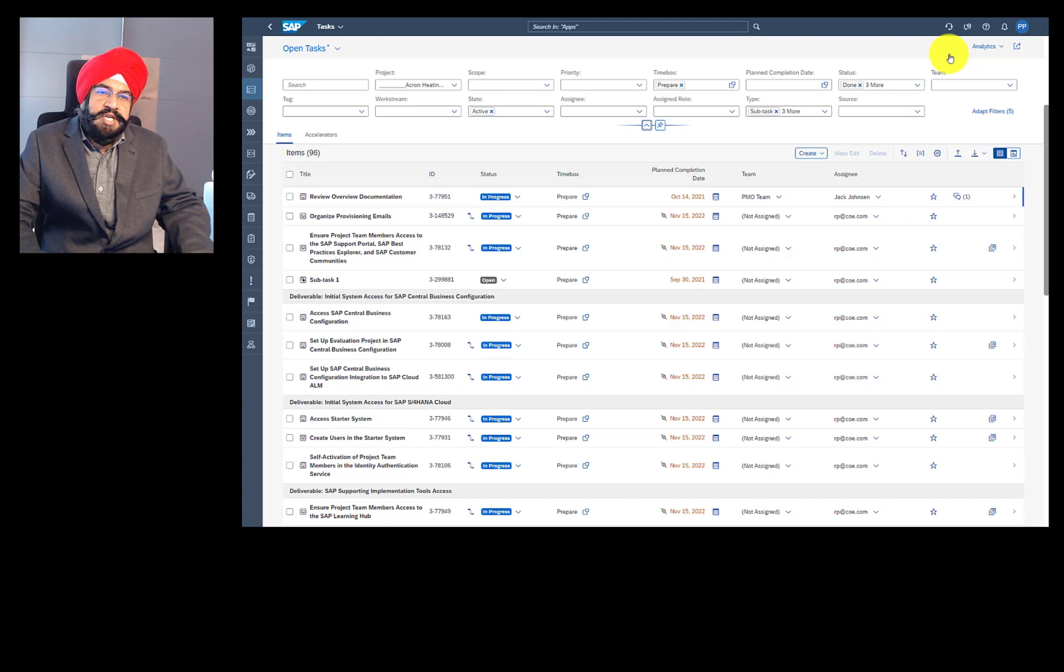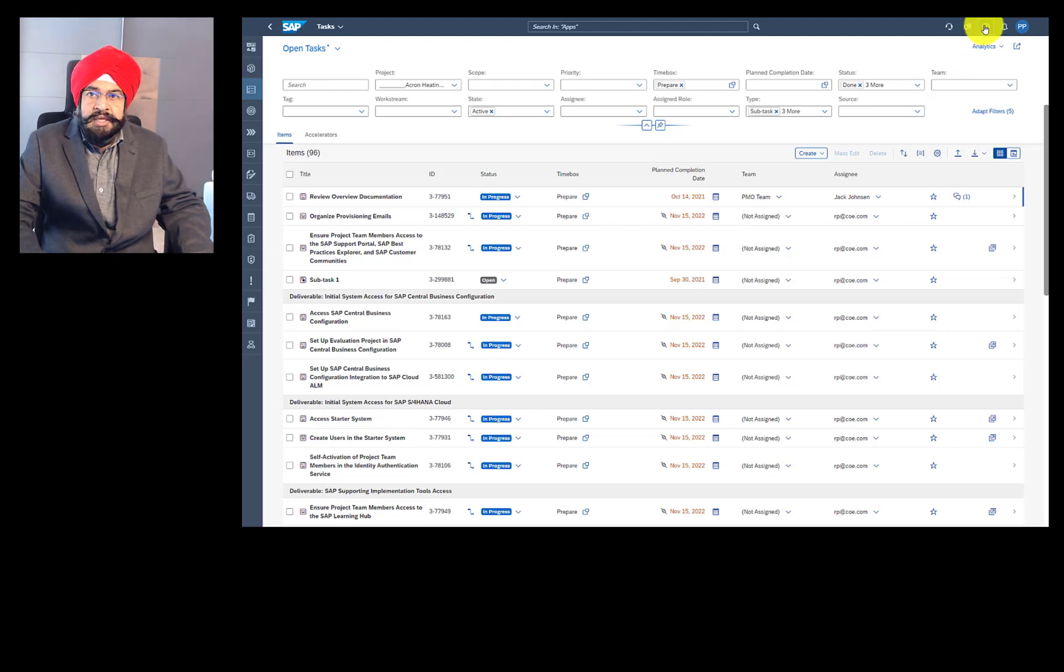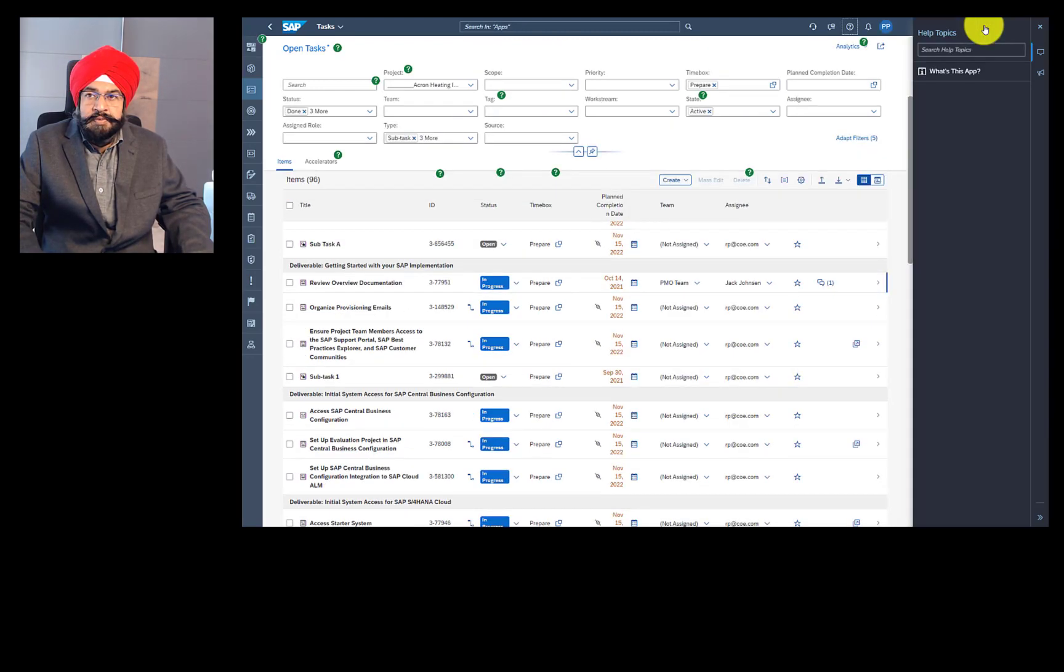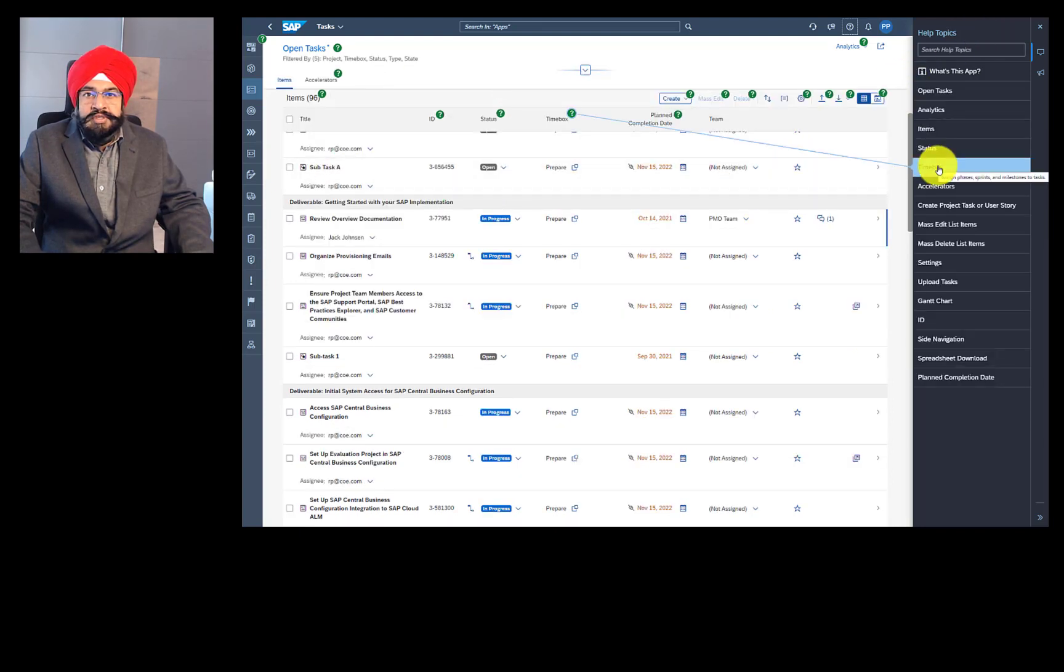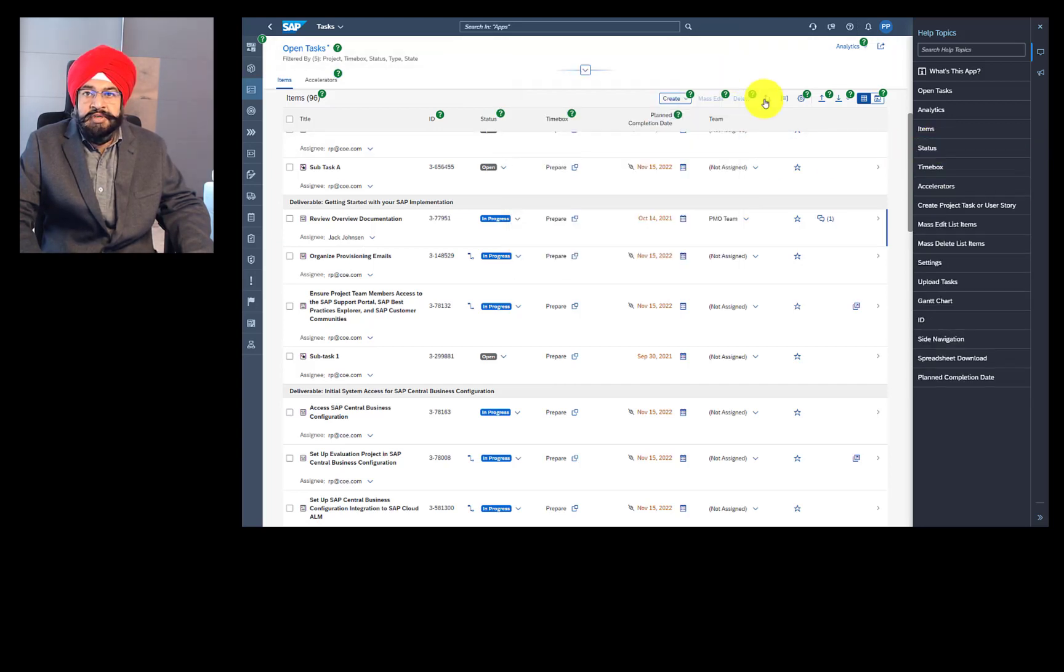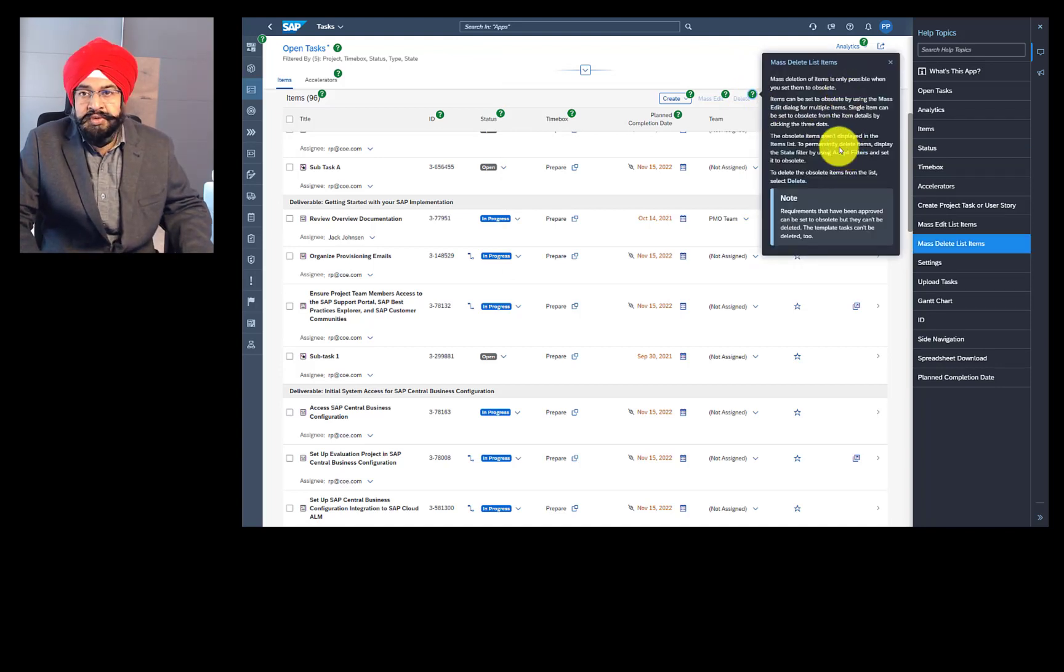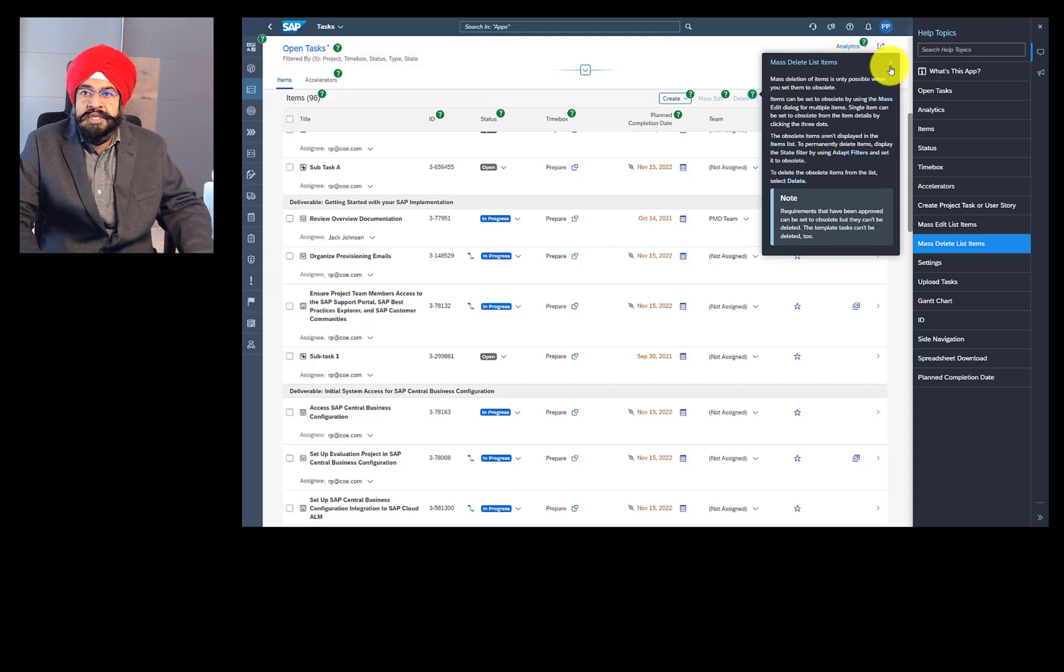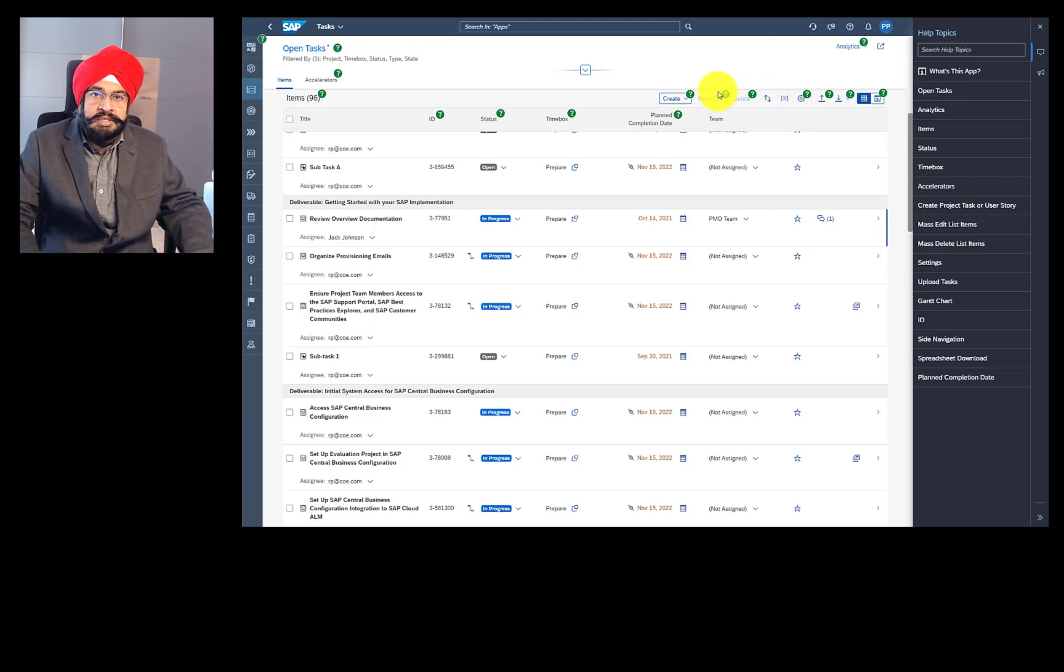When you get started with SAP Cloud ALM, then many things may not be that clear for you. So you can always use this help icon. And that opens a lot of hotspots. And you can then use these hotspots to read more about this information for status, how it is used, what are the different values, who can delete, what do I need for deletion, it has to be in two steps. First, you have to set something to obsolete and only then you can delete it. So there are a lot of fine details which are available in your application, making your life easy.